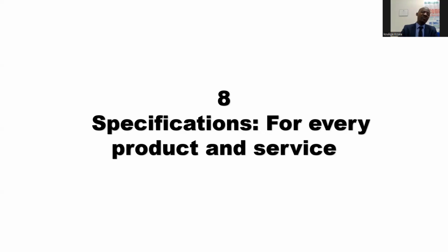And why is that important for the diaspora? If you do not do that, people are going to use any type of material for your projects. Whatever they find that is cheap. If they can save some money on that, that's what they're going to use on your project, and you don't want that. That's why in the planning phase, you have those specifications and you send them to the project manager and you talk to him until those conditions are met. Until then, there is no project. I'm not going to invest the money in it. And you make sure at the planning phase that you have that already.